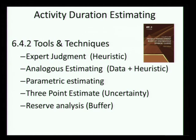Coming back to the various techniques for duration estimating: we have expert judgment, analogous estimating, parametric estimating, three-point estimate, and reserve analysis. Expert judgment and analogous estimating are very much used in construction, but only the problem is they do not have a real base — it just comes from what we call a seat-of-the-pants estimate. There are more formal ways such as the Delphi technique, where a series of experts are asked a question repeatedly until they converge on a specific number.